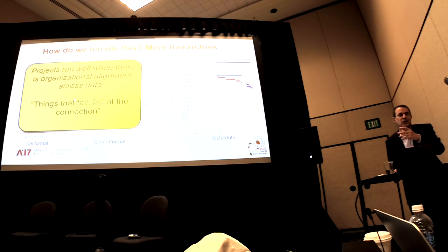When your work breakdown structure, your contractual breakdown structure, and your drawing breakdown structure are all in some sense aligned. The other takeaway is that things fail at the connections, when there are misalignments between these. If one entity has to manage across two drawings, where do errors happen? They happen between systems and they happen between drawings. So organizing your project and being very observant about how your information, your team organization, and your breakdown of work are aligned is a big piece of how we organize information.